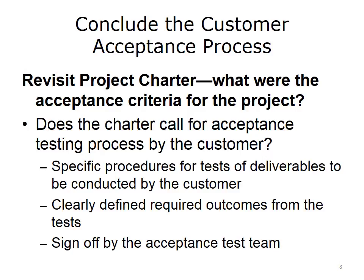In Health IT Systems, the project charter may have specified the use of an acceptance testing process. Typically, a customer team working closely with your project team will identify a set of acceptance tests that must be in accordance with the requirements for the Health IT System. The team will also define what it means for tests to be passed. Satisfactory execution of the acceptance test process will be an important determinant of customer acceptance. Examples of healthcare acceptance processes range from showing that computerized provider order entry (CPOE) orders are received in ancillary departments, to simulating the admission of a patient through dropping a bill for that patient.